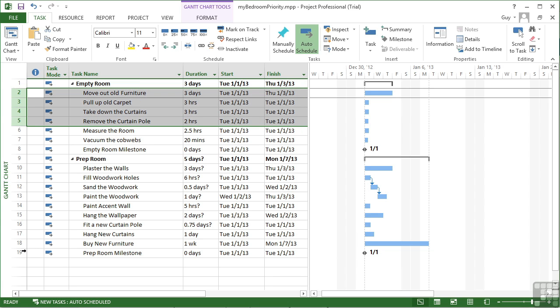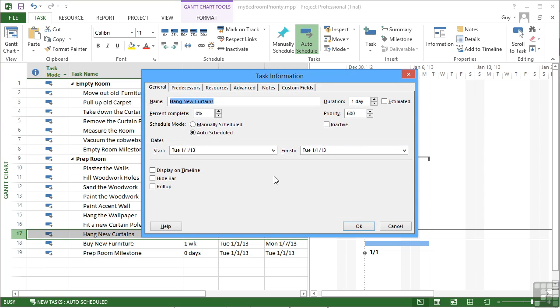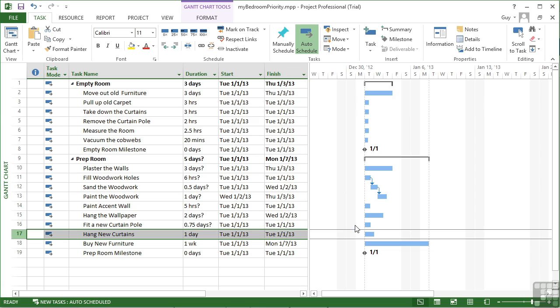And we could go down here and say hang new curtains, and let's push that one up. Very important, 800. Now, until we actually get to sorting and filtering, you can't see what the priority values are without going to each task's task information box.